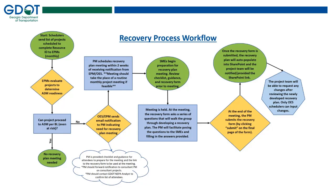Once the EPM makes that A3M determination, they will send a notification email to the PM — either saying we're good to go to A3M as scheduled, or that we cannot proceed to A3M and a recovery plan meeting is needed. That email will provide the PM with all the details needed on next steps for actually scheduling the recovery meeting. There'll also be guidance for them to provide to SMEs for preparing for that meeting, and the email will include the information and materials needed for the PM to move forward with scheduling.